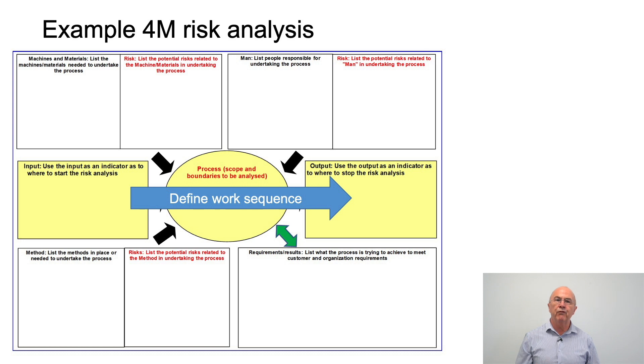What we see here is an example of a 4M risk analysis. The first thing the team would do is to define the boundaries: where are we going to start the 4M risk analysis and where are we going to finish. It's really clear that we do this before we go on to understanding the 4M that will affect the process. The next thing the team needs to do within this particular step is to define the proposed work sequence.